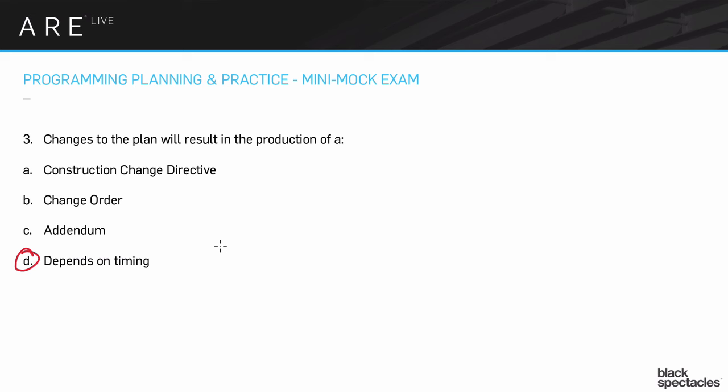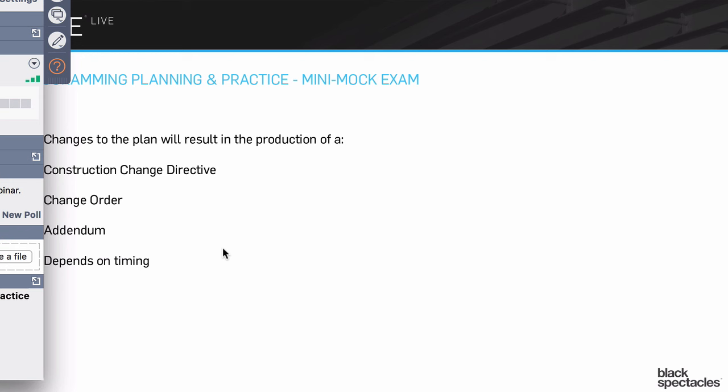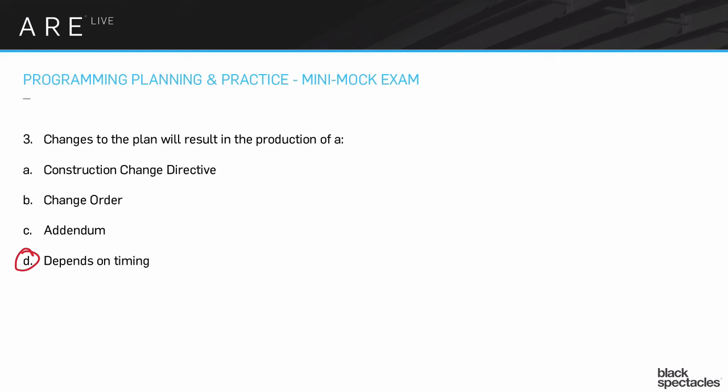Once we have a general contractor chosen, once we have a bidder chosen, then a change is a change to the contract. And so when their bid was accepted and the contract was all put together, your drawings, the specifications, the addendums, all that stuff becomes part of the contract between the owner and the contractor. So that's all the contract. And then if something needs to get changed, and it happens all the time, lots of things change, something needs to get changed, you are changing the contract. So that's a change order.